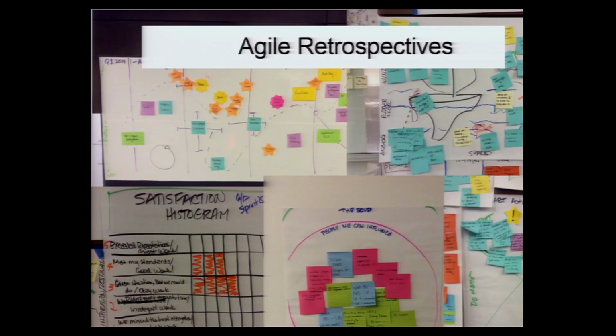In Agile, you tend not to have that problem. So it's a poor assumption on the part of annual planning that you can know everything. Agile's assuming that you not only can't know everything, we're not even going to try to predict way out into the future. We're just going to do the changes a few weeks at a time. So that they don't end up having to throw out a lot of plans because they're not usually working very far beyond the threshold of knowledge.